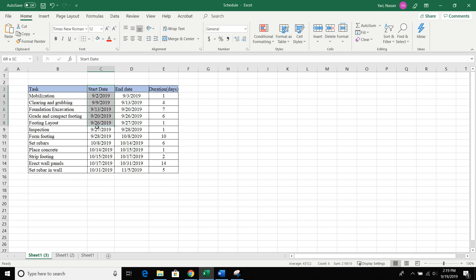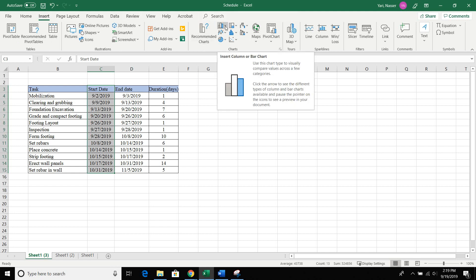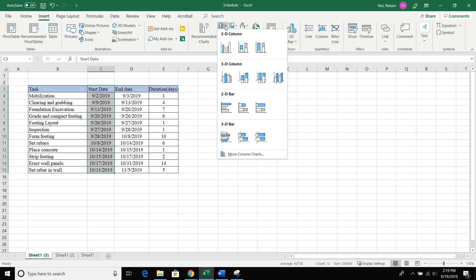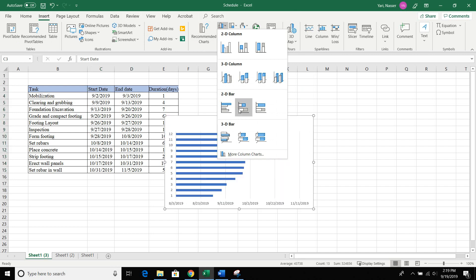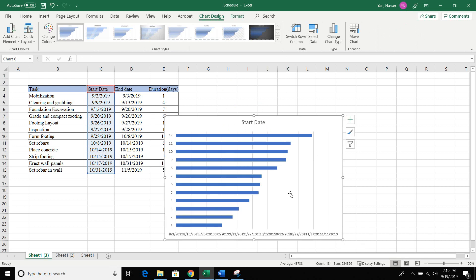Go ahead and click on the start date, hold down your mouse, and drag all the way down to the bottom. From there go up to the top and click Insert. Once you click Insert, come back halfway through — you can see the bar graph option right there. Click the drop-down button, select bar graph, and you'll see a bunch of graph types. Go down to the 2D sideways one, go to the middle one — when you hover your mouse over it it says Stacked Bar — and click on that.